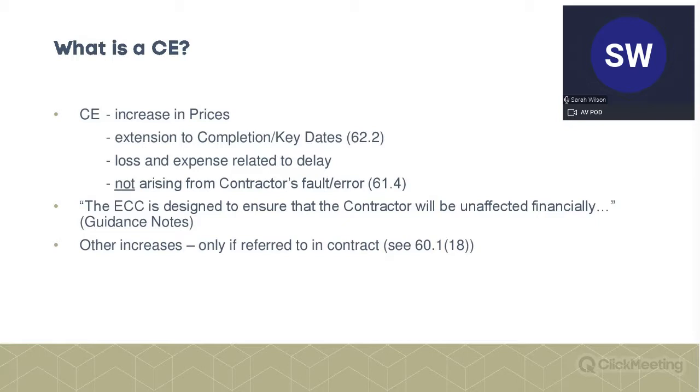So this isn't aimed at a situation where contractors are expected to make a loss on something because it's extra work. As could happen with JCT, if the rates in the contract aren't great and are analogous to variation work, then the contractor is effectively penalised because it's only entitled to claim those rates for the variation work.